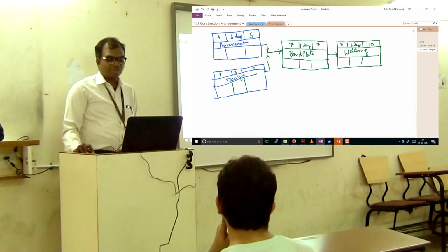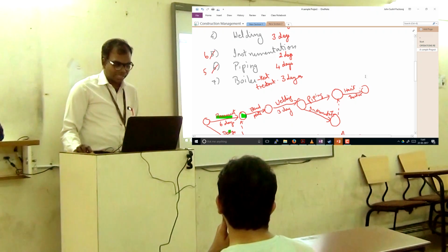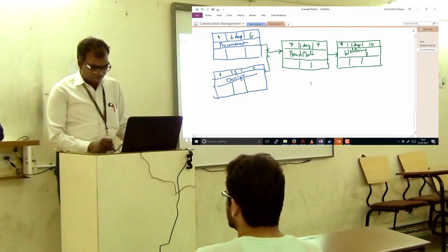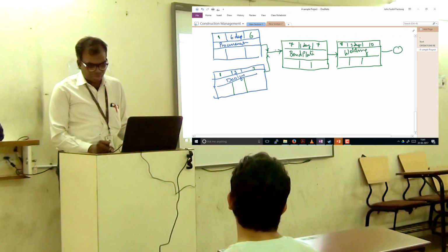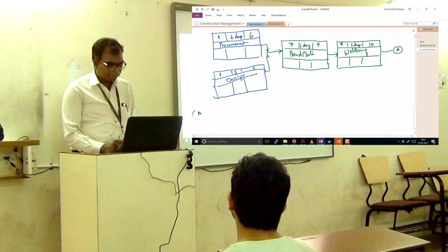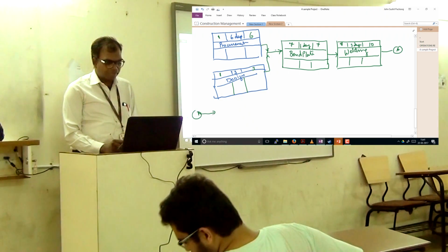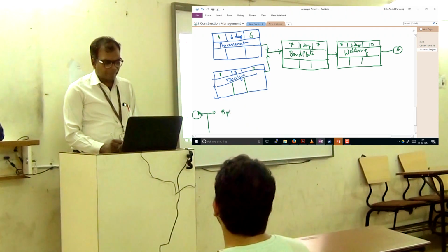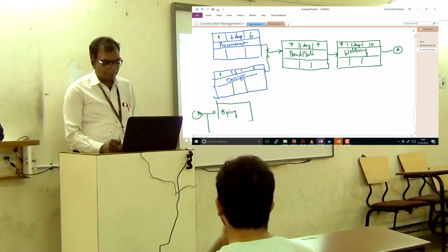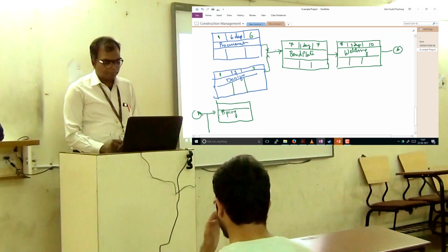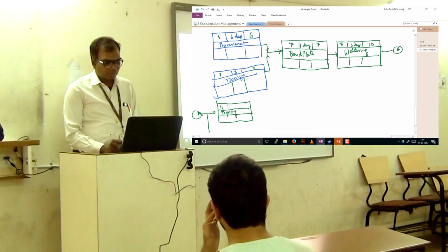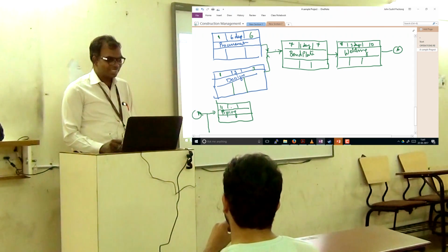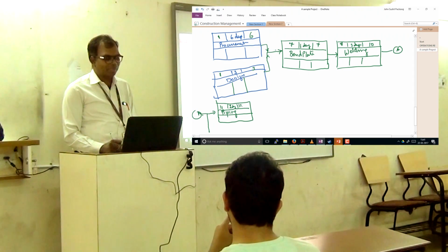10th. So then we branch again here. Piping and instrumentation, we are saying, go hand in hand, so I'm just connecting it here. Now when does piping start? 11th day. What is the duration here? 2 days. So then this becomes 12.